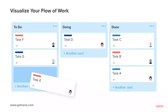The first practice is to visualize the flow of work — mapping your value stream on a Kanban board. Each state corresponds to a status, each ticket represents a piece of work, and work flows through the process as tickets move across the board. You can implement this practice using the Kanban boards in Jira or Trello. This gives you complete visibility on how much work you have on your plate and significantly improves collaboration within the team.